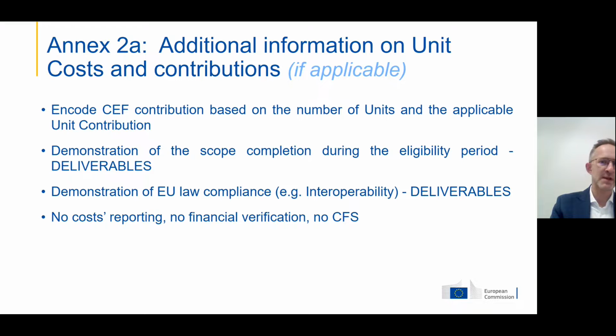For some projects which we implement, they are based on so-called unit costs and contributions. This is a simplified way of monitoring projects and reporting to us. Basically, there's no cost reporting, there are no financial verifications, there are no audit reports, but what we still need from you are the deliverables. We will never pay you if you don't have these deliverables on site and you will not show them to us, so please keep that in mind.